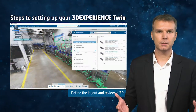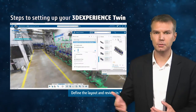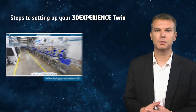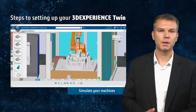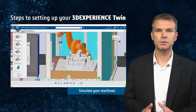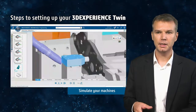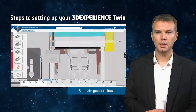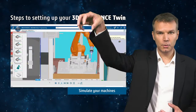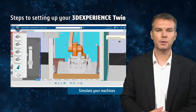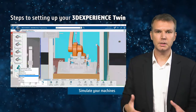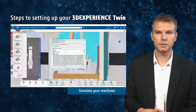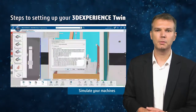You want to understand the space allocation — should the machine that you want to acquire fit into that space? The third step is about making sure that the machines you have are fit for purpose. Will that welding machine collide with the product when welding? Will the arm be able to reach that place during operations? Those are the things you want to secure before acquiring or selecting an equipment or workstation.